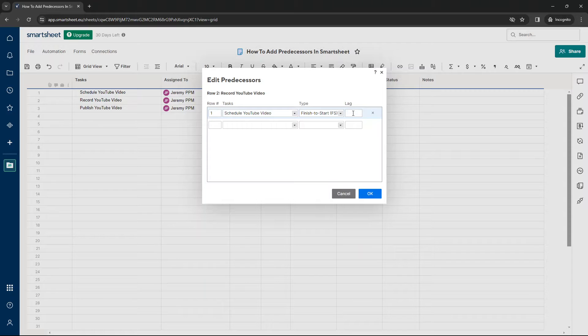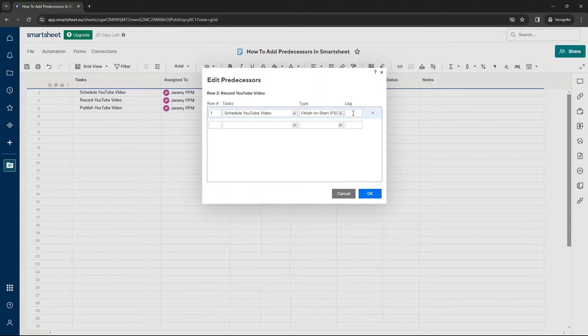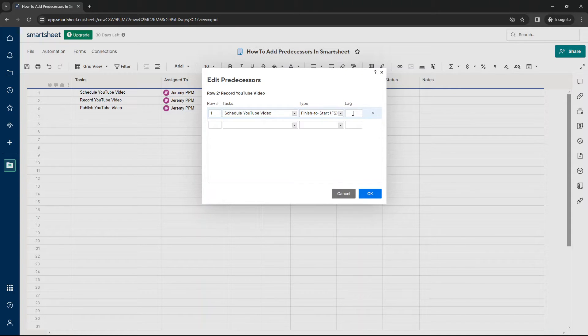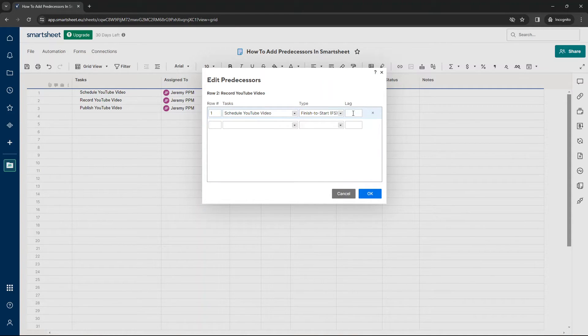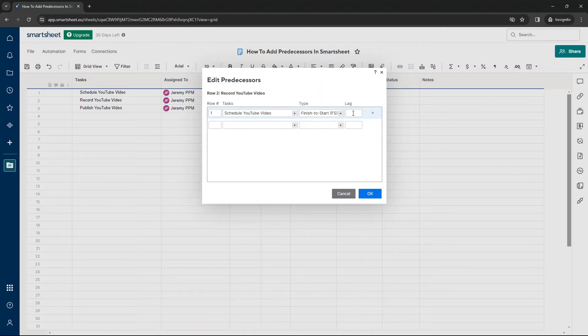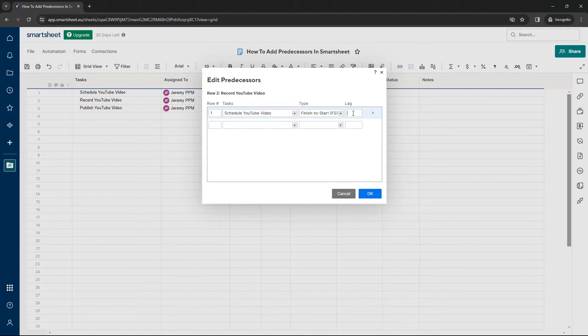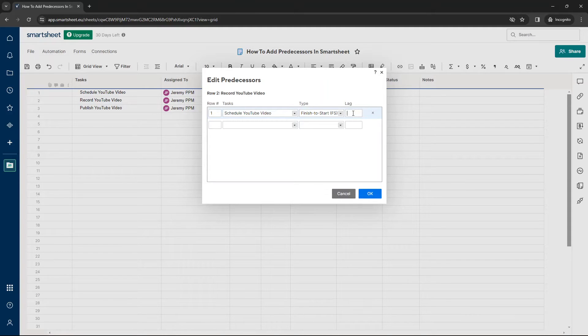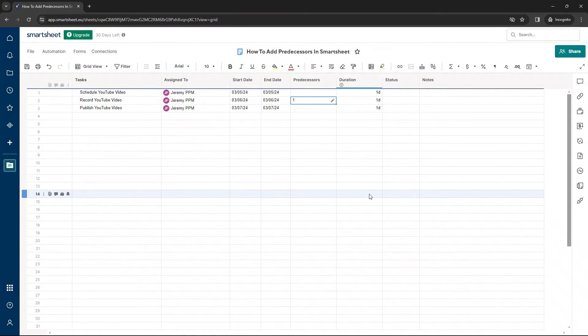Lag is essentially the number of days in between until you can start. So as an example, let's say we wanted to schedule our video on a Monday and we didn't want to record till a Wednesday. We would put one in there. So one day, there's a one day lag until we can next start. But we don't want any lag in this example. So I'm going to put in zero.